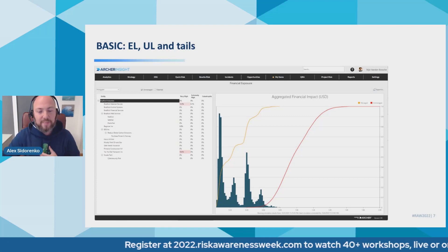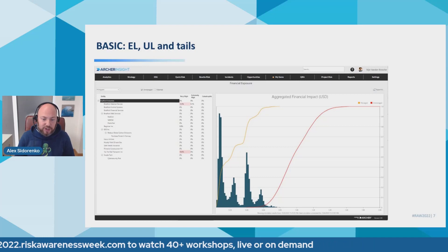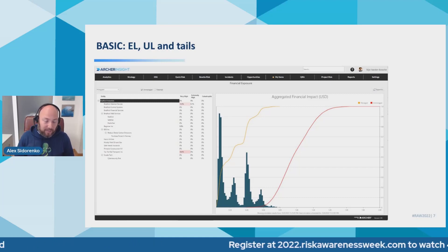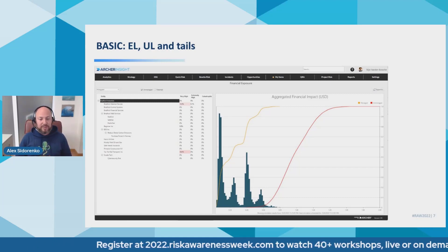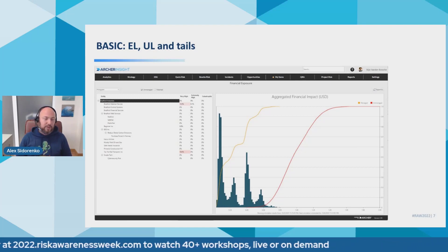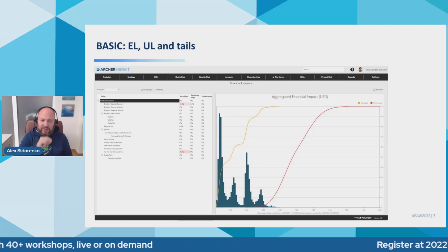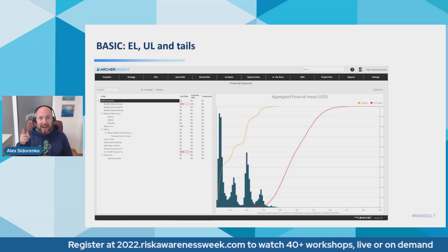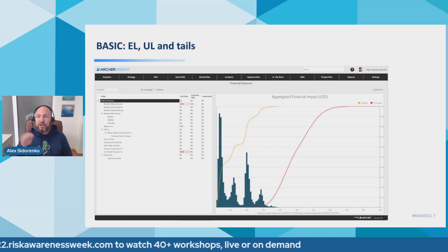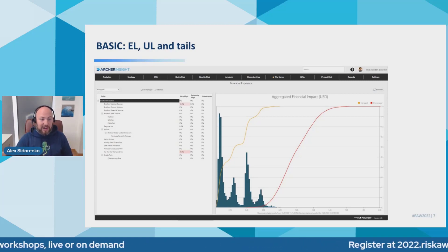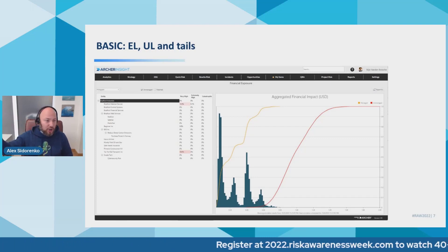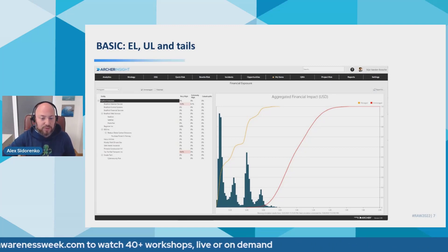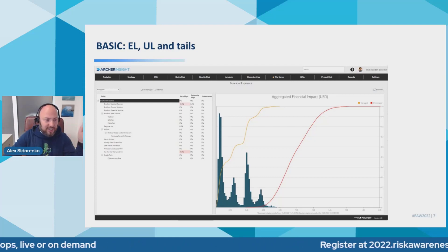Marcus is asking a very important question: are there instances where P50 median is better than the average expected loss, because it excludes the extreme tails? One example where I've used P50 instead of expected loss was for environmental risks — water pollution, air pollution — because it's super fat-tailed. There's a very small probability your plant will be closed for 90 days and that's immediately millions of dollars lost. Our average was actually bigger than VaR P95 because the tail was so ridiculously large, so we ended up using P50. But most of the time, unless it's a super fat-tail distribution, you should be fine with the average.